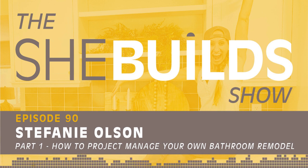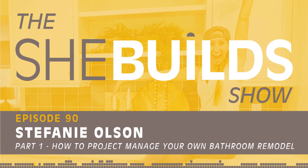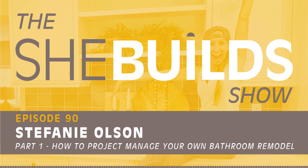So you're going to want to know what type of edging and grout colors you're going to be putting in the bathroom for both the floor tile and the wall tile. If you want a niche, a little inset inside of your bathroom, you're going to want a tile and edging or trim around that niche. You're going to need a backsplash if you want to do a backsplash on your vanity. So these are all just tile pieces. A backsplash on your vanity that is tile, or you can always take the countertop up into the backsplash. So that's tile. Then you're going to want your paint colors, your cabinet colors, your countertop colors, your sink, and your plumbing fixtures. So your toilet, your faucet on your sink, your shower head. If you have a tub, you want all of those pieces.